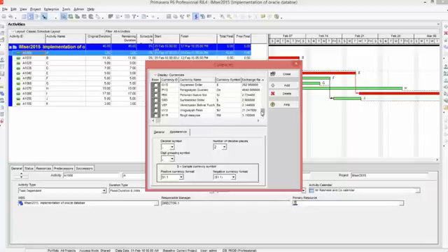If you want to create, let's say, Nigerian naira as a currency in Primavera, you can press add and currency ID you can specify NGN and currency name is Nigerian naira and currency symbol is N. And what is the exchange rate with respect to dollar?